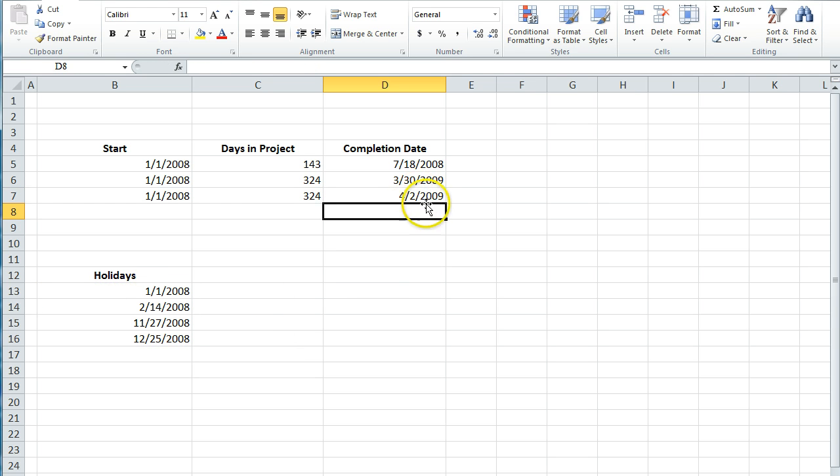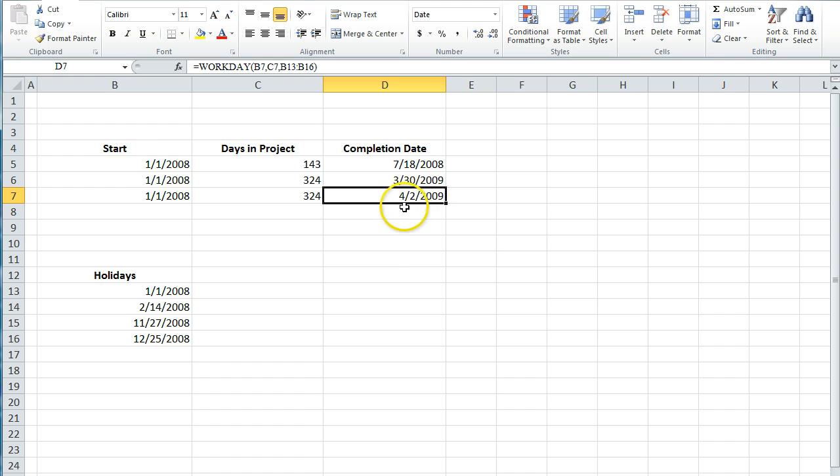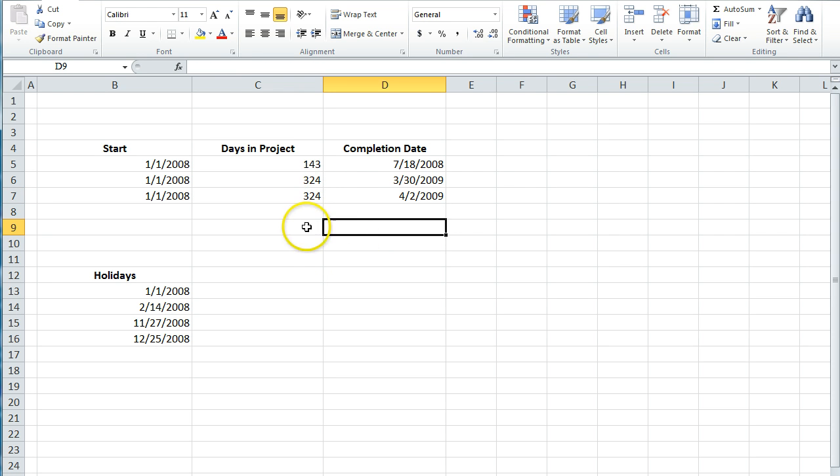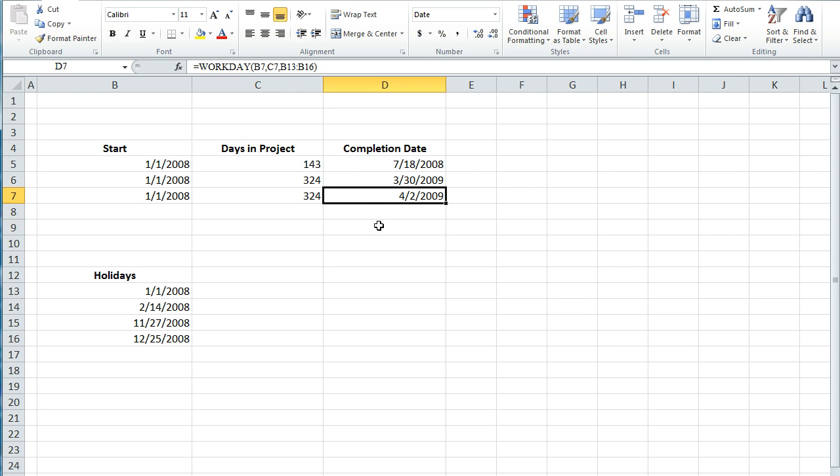And this is a more accurate number. We see that this will end on April 2, 2009 instead of March 30. You'd have more holidays in real life, obviously, but this is just an example. So that is how you use the workday formula to calculate a completion date of a project.